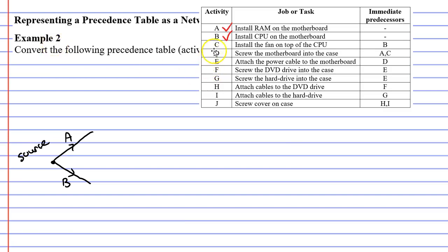So now moving on to activity C we can see that activity C comes after activity B. So we need to complete activity B first and we do that by drawing a vertex and then activity C comes after that. So let's tick off activity C and now look at activity D.